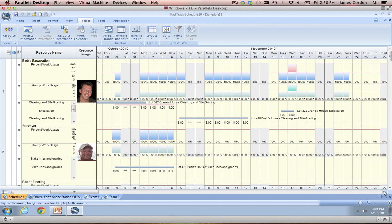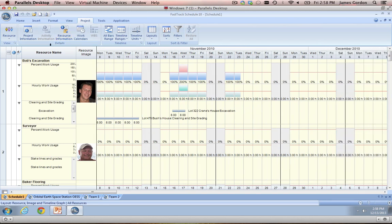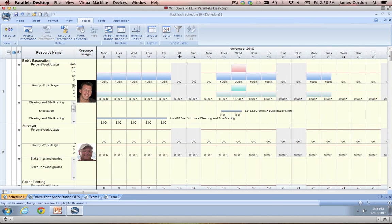This really comes in handy when you're trying to spot over-allocations in your schedule. Looking at our first resource, Bob's Excavation is working normal days — 100% of our default eight-hour workday. But once we get to Wednesday the 17th, Bob's Excavation is assigned to 200% of the work in a day, or 16 hours in our default workday. What this resource view will allow you to do is flip quickly through, spot these over-allocations, and then fix them as needed so you don't have any of your resources biting off more than they can chew.